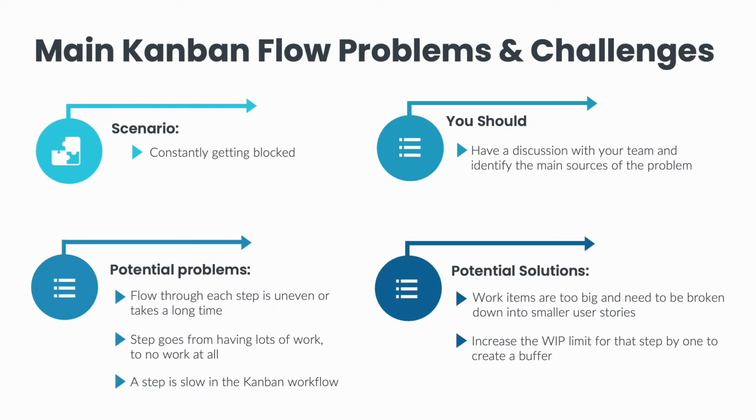First, you would probably do a quick root cause analysis with the team and see what are some things you can do to make things faster. You could, for example, reallocate some people to the slow step or improve your tools or systems. You can adjust and lower the WIP limit for the other steps so that you can assign more people to the slow step.